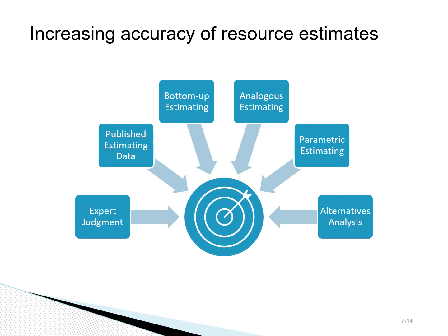Sometimes we can use estimates for similar components or modules. This is called analogous estimate. If we need to build an interface between two systems, maybe we have done that in similar cases, and we can use the actual cost that we incurred for those interfaces.